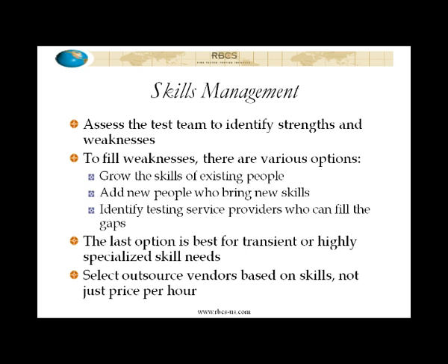Things like development of test cases for particular areas of the application or performance testing or setting up particular kinds of environments, right? So you need to be specific enough about the tasks to actually identify the skills required for them, but you want to try to do it as much as possible in a project-independent way. Then, for each one of those tasks, you ask yourself, what skills would somebody need to have to be able to do this task effectively, right? And now you're able to generate a list of skills that's driven by what you actually do.